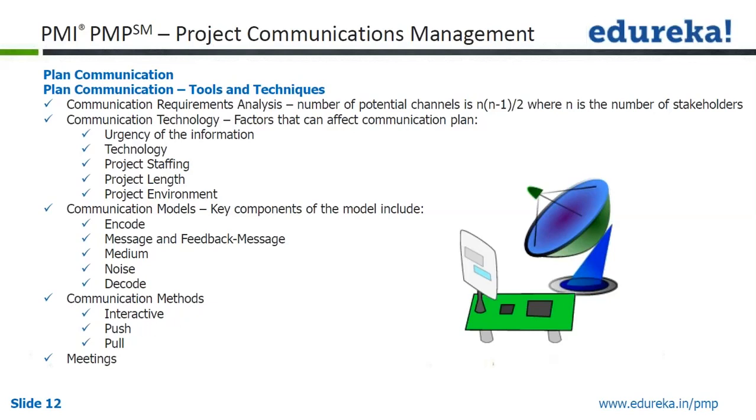Coming to push technology, it depends on how many stakeholders are involved. Let's say you have a few tens of stakeholders involved, maybe 30, 40, 50. You may push the information using email, memo, or whatever the medium is, and that is called push communication.